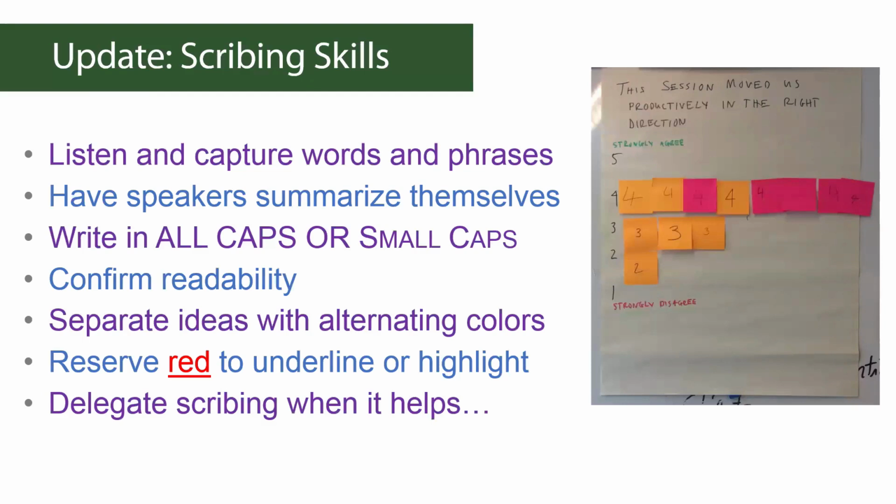Well, that's probably a separate webinar in its own right. One thing that I will say to begin with is that when you're doing retrospectives, and you've invited the right people, let's just assume that it's your Agile team, you want everybody to have an equal ability to participate. The trickiest situation is when you have, say, 6 or 7 people in the room and 1 or 2 people not in the room. That is the most tricky situation, because you basically end up marginalizing those people that aren't in the room.